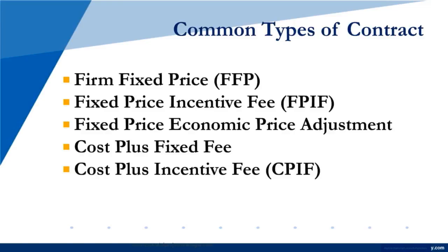Cost plus incentive fee. The fixed fee is based on whatever is agreed to. When it's an incentive fee, that means that there must be certain conditions met by the seller to the buyer's agreement. And those are usually set forth in the contract, and it can be on performance, it can be on how well they meet the user acceptance of the product. There's a lot of different moving parts potentially in that. But it's conceptually the same. Whatever it cost you to build it, plus whatever we've agreed to give you on top of that as an incentive, because we want it done well or we want it done fast or something like that. But the incentive fee may be a scaled fee, not simply a flat fee on top of it.